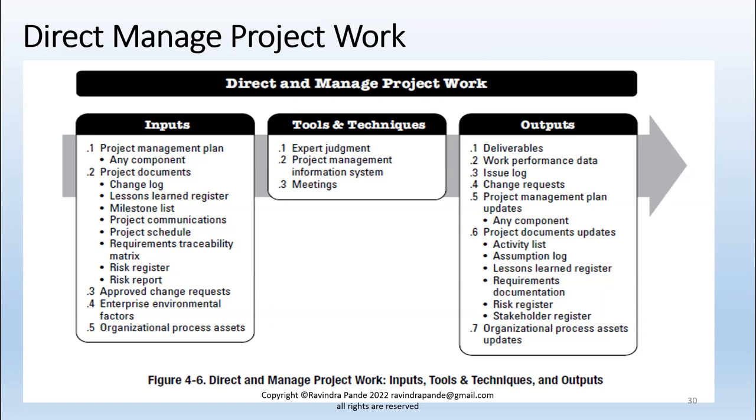There are projects called fixed price. So what they'll do, they'll give you, let's say, 10 million if you complete this enhancing attendance management solution within the next 6 months. So that's a kind of fixed project. Or they'll tell you, have 6 resources on this project for the 6 months, and I'll pay you so and so amount, or on an hourly basis, let's say $50 per hour, $80 per hour, $120 per hour, depending on the various skill set and experience level of the resources, as well as the brand value of an organization or the brand value of a technical partner as well.